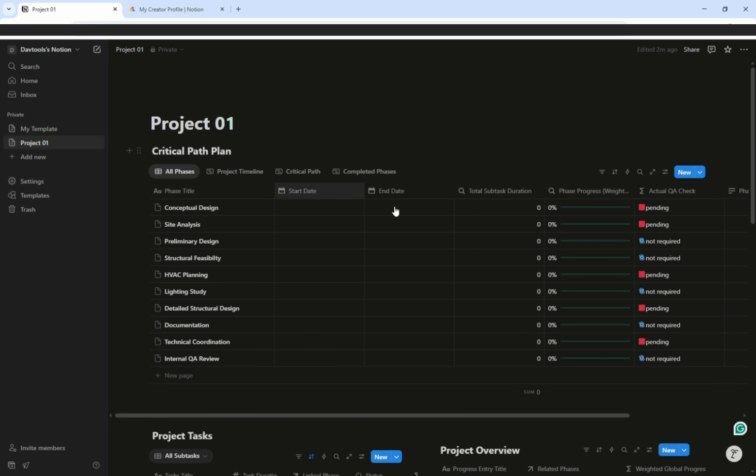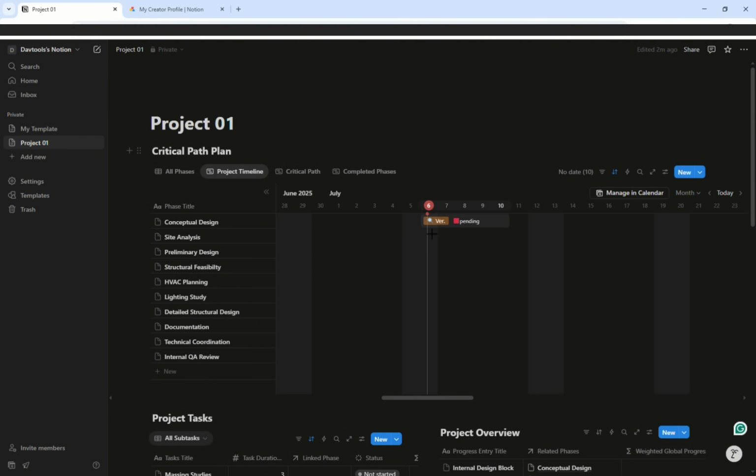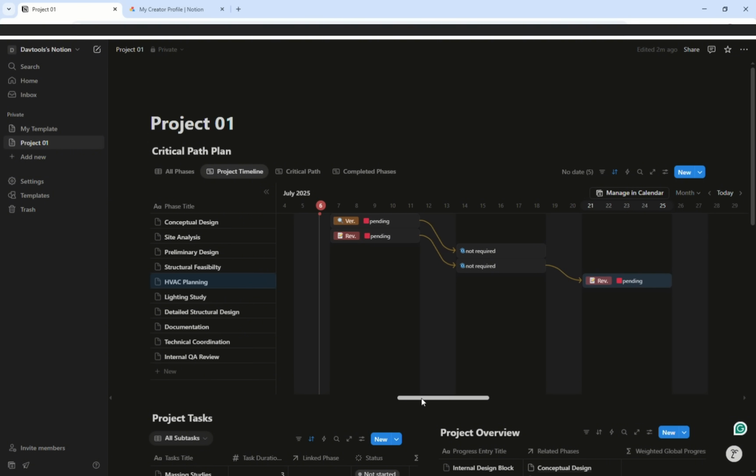We'll proceed to assign the main phases the project manager has planned onto a calendar. The project manager places the phases according to their design intent. They will also connect the different phases by identifying which one prevents the start of the following phase or phases. During this process, it's likely they will make several adjustments, freely moving phases or groups of phases forward and backward.